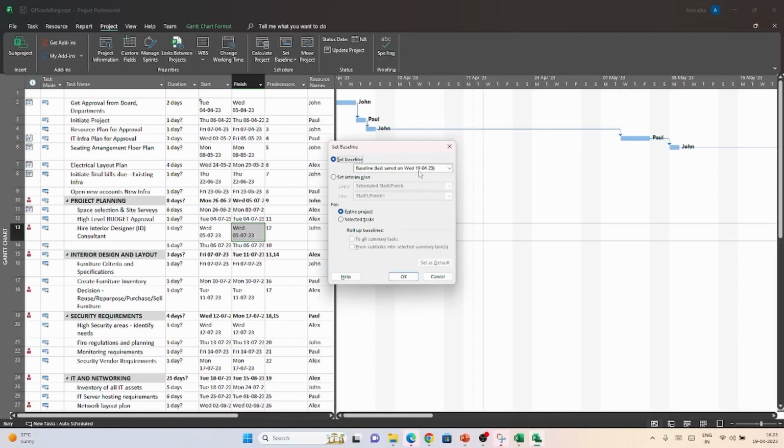This date should be for the date when your team reported the progress and not for the date when you are updating the plan file. Very often, this will be offset by a day or two, and it may seem like a very simple thing. But if you're running teams with 20 or more members, a single day can mean your update is off by a person month of effort. Just keep this in mind if it is relevant to you.